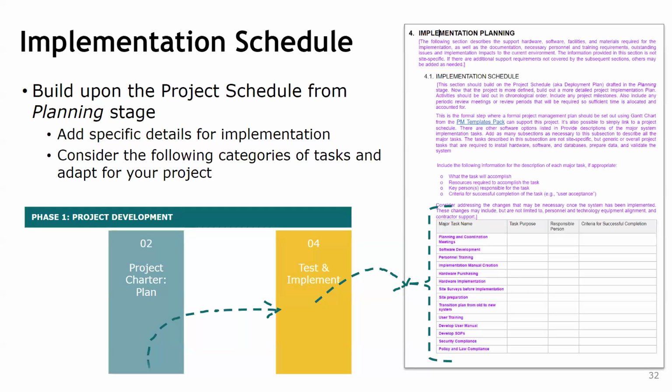Work with the organization to develop SOPs, which are standard operating procedures, to ensure that they define how they want the system to work, and how each process should be. So these are all part of the schedule. So they need to be defined on when each thing will happen, each task will happen within the implementation cycle.